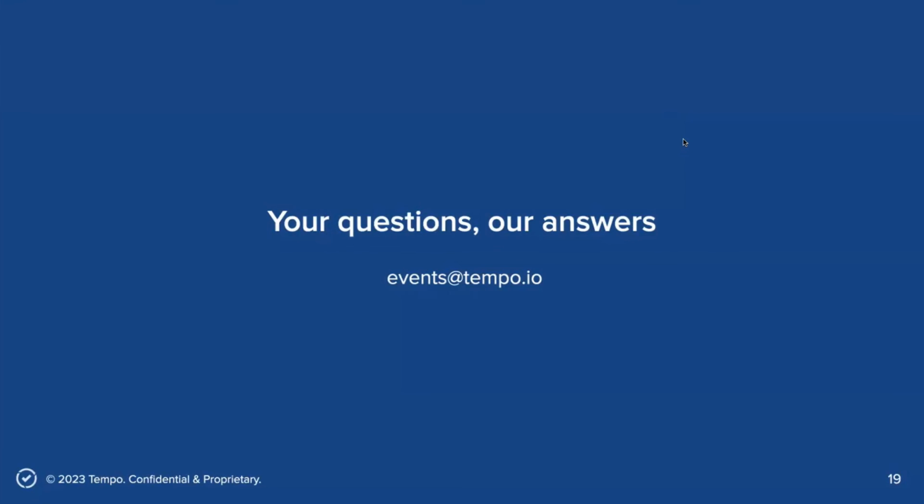Yeah, as I showed, each member per project has their own rates set up. Obviously, you can have the global settings, global rates per team role, but each team member per project can actually have their own cost rate. As I showed, you can ignore the global rates per team role and set your own, and you can even set future dates. So yes, each person can have their own cost rates per project. Perfect. Thanks.